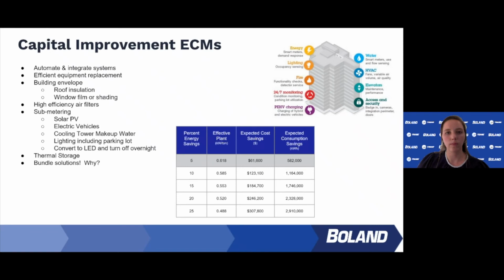But now, 2 years later, you're going to your procurement person and saying, I need a new chiller, but the payback is, say, 5 years, and they say, well, that's just a little too much. However, if you had bundled those projects together, then you're looking at a 3-year payback. Right? So I would encourage those of you who have a lot to do: we love the low-hanging fruit, but you can really maximize the value of it when you bundle it with the other things that you might need to do in your building.